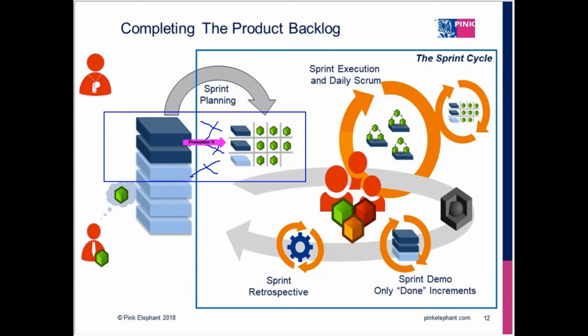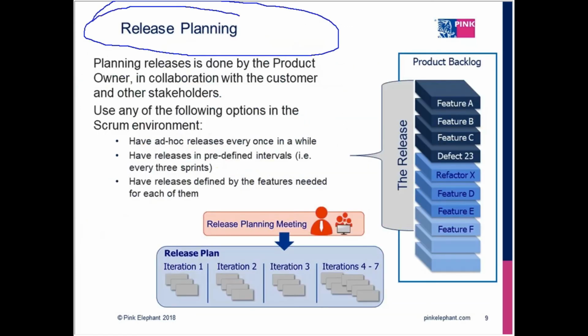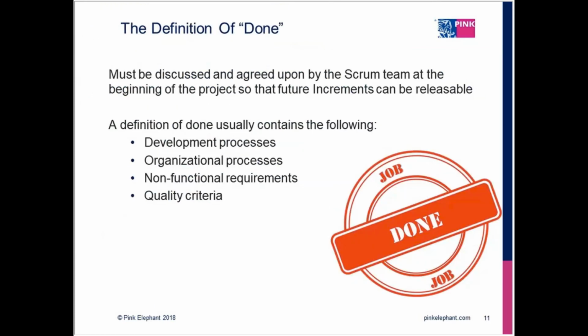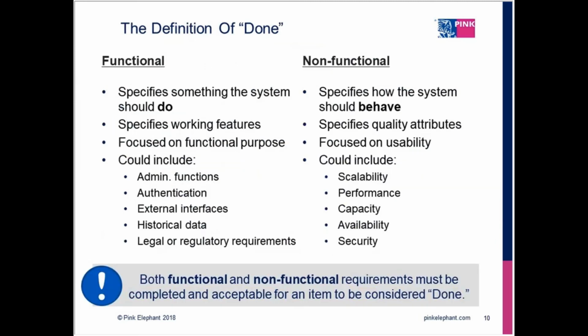And then another question here about how do you relate ITIL transition processes and product release and so on to the product backlog. The whole ITIL framework relates to the product backlog primarily around the concept of the definition of done. So the definition of done are my organizational processes, such as making sure we have an SLA for whatever product or feature, making sure we have availability, capacity, and continuity, these types of things designed for every feature, making sure we go through the proper release and quality checks and testing and validation. So the ITIL framework is basically applied to the non-functional requirements, because in ITIL, it's got everything built in.